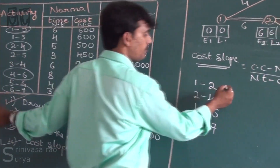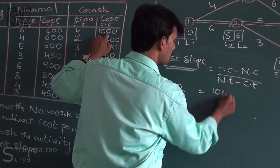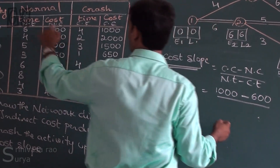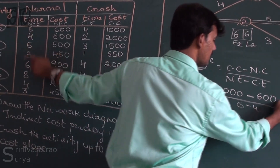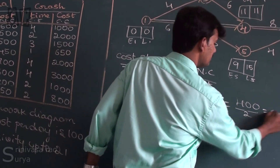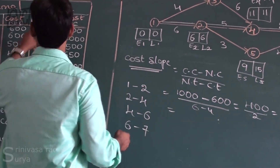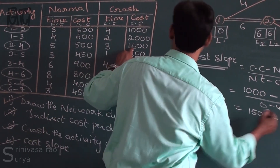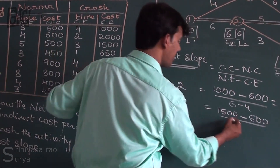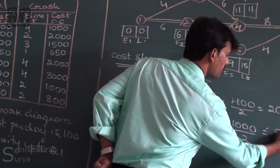For activity 1 to 2: cost slope = (1000 minus 600) divided by (6 minus 4) = 400 divided by 2 = 200. For activity 2 to 4: cost slope = (1500 minus 500) divided by (5 minus 3) = 1000 divided by 2 = 500.